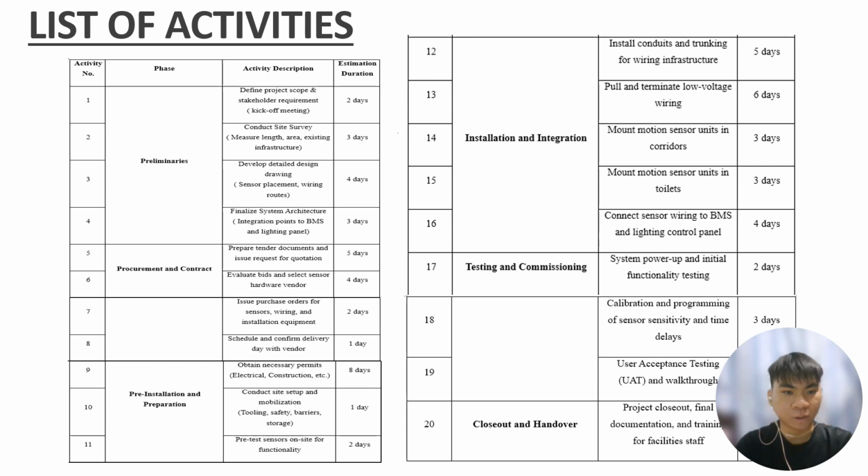This is the list of activities for this project. The project starts with the preliminary, then procurement and contracts, followed by pre-installation and preparation, installation and integration, testing and commissioning, and the last step is close out and handover to the stakeholder.